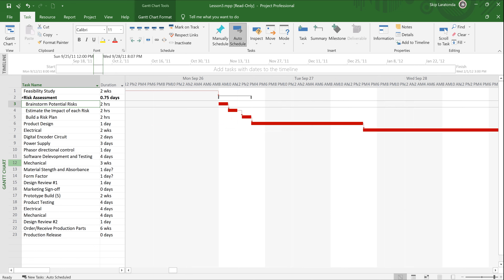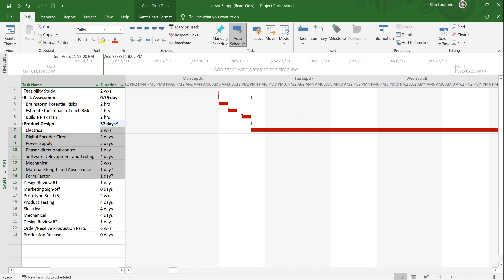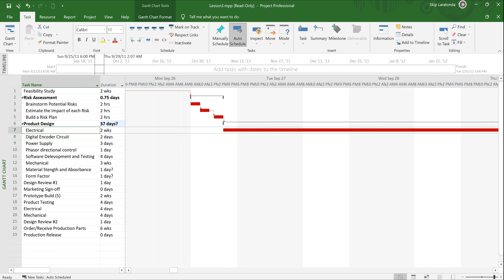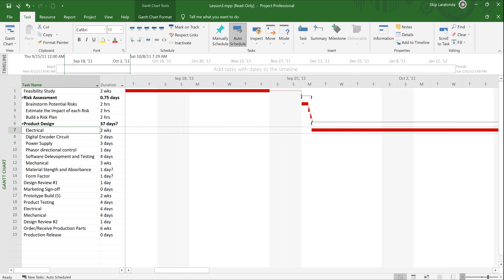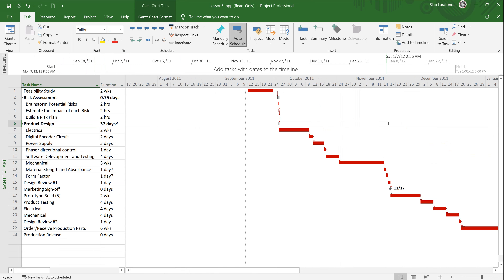Just as a demonstration — you'll have your own summary tasks and subordinate tasks — notice tasks 7 through 14 are all part of Product Design. I'm going to demote those and scroll to task and zoom out a bit. There it is — Product Design shows a summary bar in the Gantt chart, and it's comprised of tasks 7 through 14.